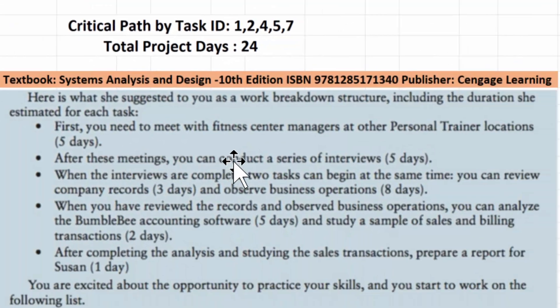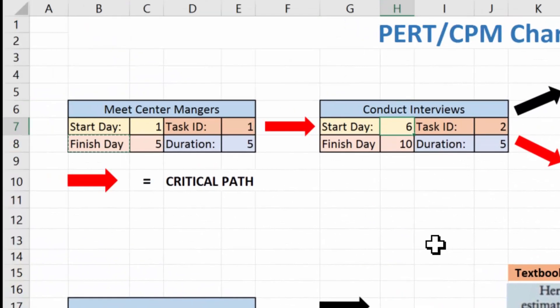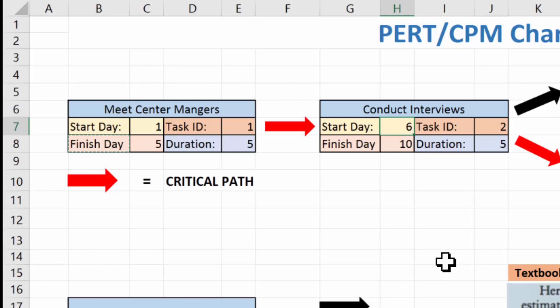After these meetings, you can conduct a series of interviews. That means we can't do these concurrently — they are sequential. Only after we finish task one can we do the next one, which is conduct interviews. Conduct interviews will start on day six of the project and takes five days to complete, finishing on day ten.